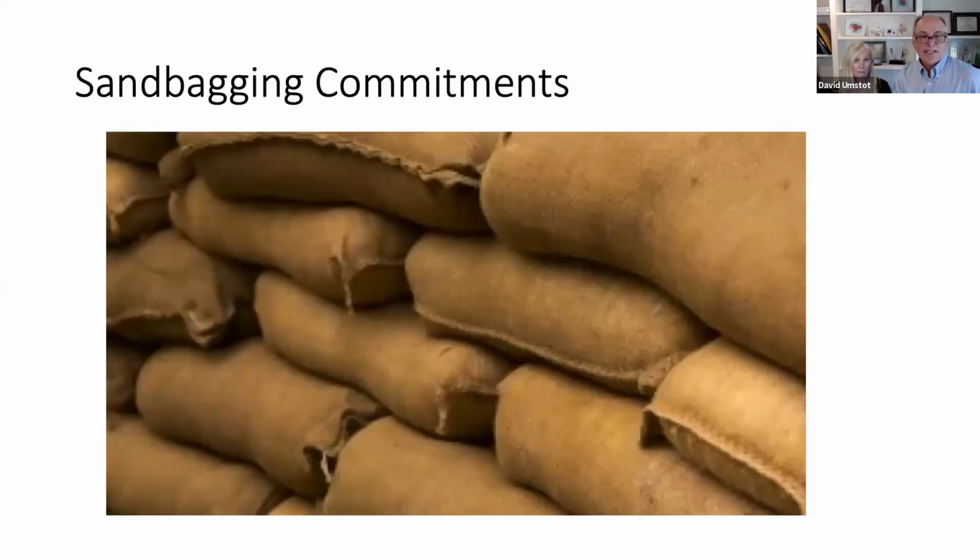Okay, sandbagging commitments. I think Ken talked about this 4 weeks ago when he did the Last Planner 101 presentation. But we see this a lot, and this all comes back to a fundamental lack of trust in the ability of people to deliver what they say. As trust builds in the team, sandbagging goes away. There's no question about that. But coming back to the 5-day curse and the 5-day durations, people will put buffer into their activities because they don't want to be penalized, if you will, for what others do or don't do.